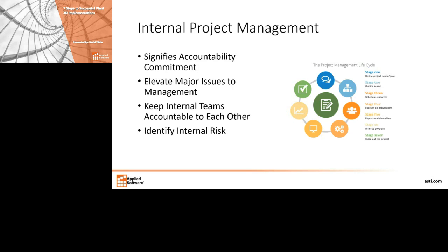So a project manager is going to know all of these different aspects and has access to resources to find out all these aspects. And so they will be in a much better position to identify where the schedule might be impacted by other projects, might be impacted by other personnel, or maybe there's a conflict with other groups, or maybe there are multiple teams responsible for other implementations of other products in the company, like maybe a customer system, management system, or some sort of infrastructure type of system, like a new IT upgrade or email or exchange. So project managers are going to be in the loop and be able to identify those items and also see how they would impact the schedule.